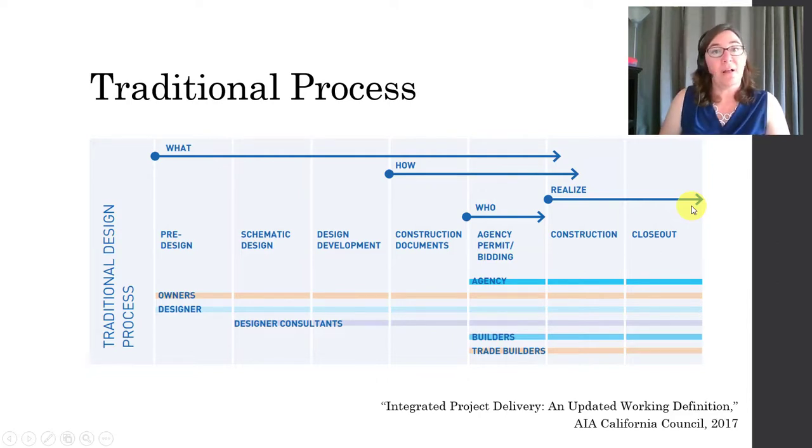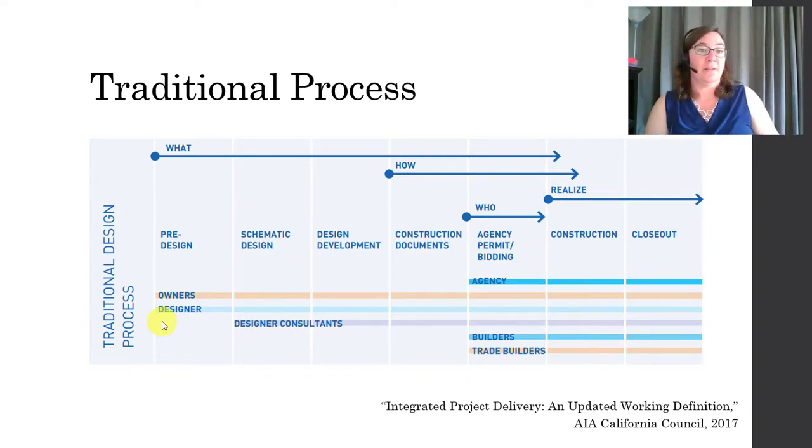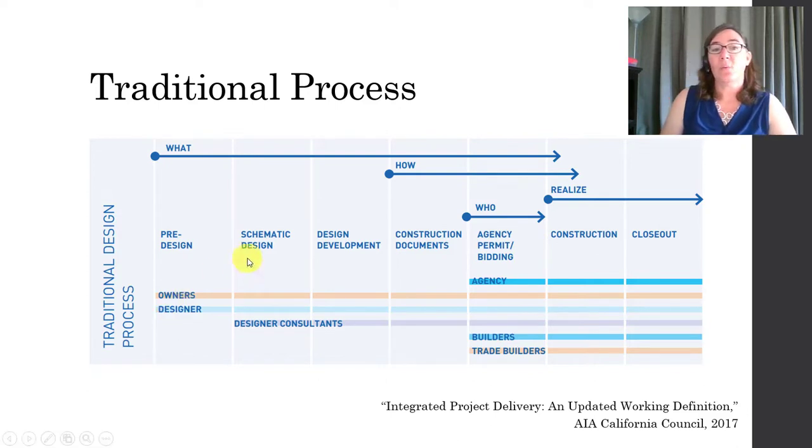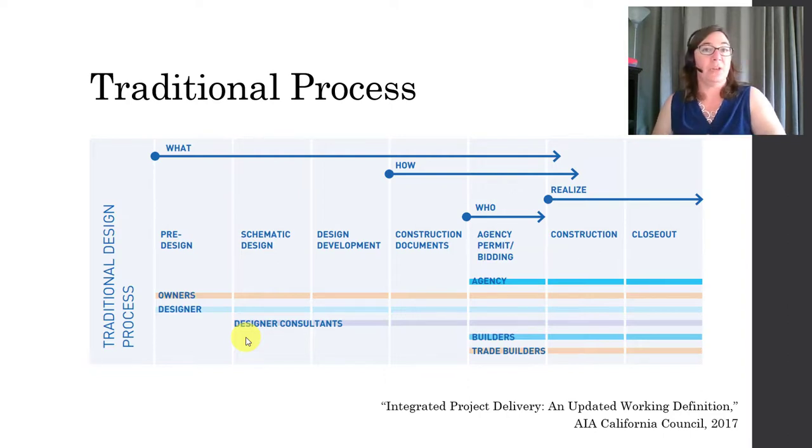So who is involved in the traditional design process? Well, way back here in the pre-design phase, of course, the owner is involved, your client, and the designer. This is usually the architect. Starting with some of the early design phase, consultants are brought on board, and this could be engineers, interior designers, many different types of consultants.